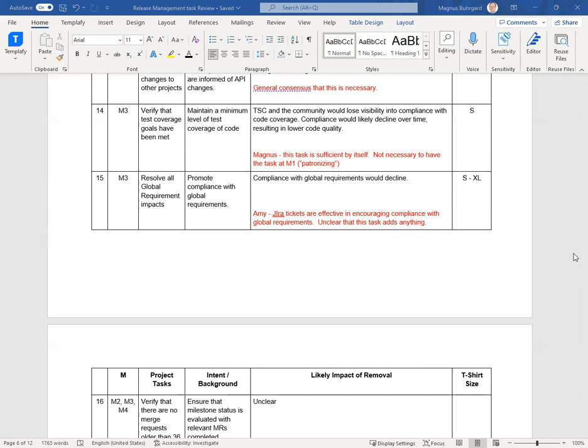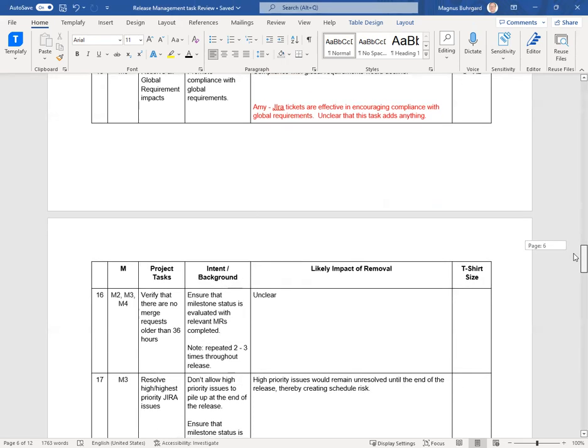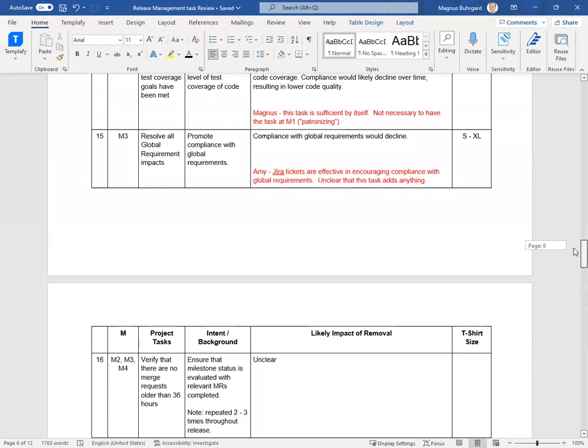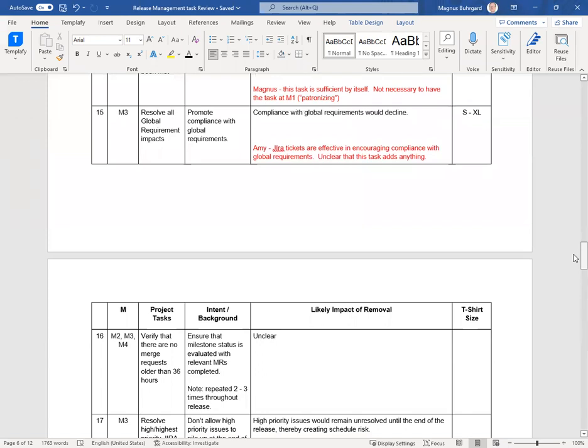Yeah, because most of the global requirements are related to things that SecCom is doing. Mm-hmm. And for those requirements, SecCom actually generates tasks for each of the projects. So they identify the tasks that are affected by a particular global requirement, related to security, and then we track those. They're set up as subtasks to the REQ. So if you pull up the REQ JIRA for the global requirement, then you can see all of the subtasks assigned to the affected projects. And so we could track the status of the global requirement that way.